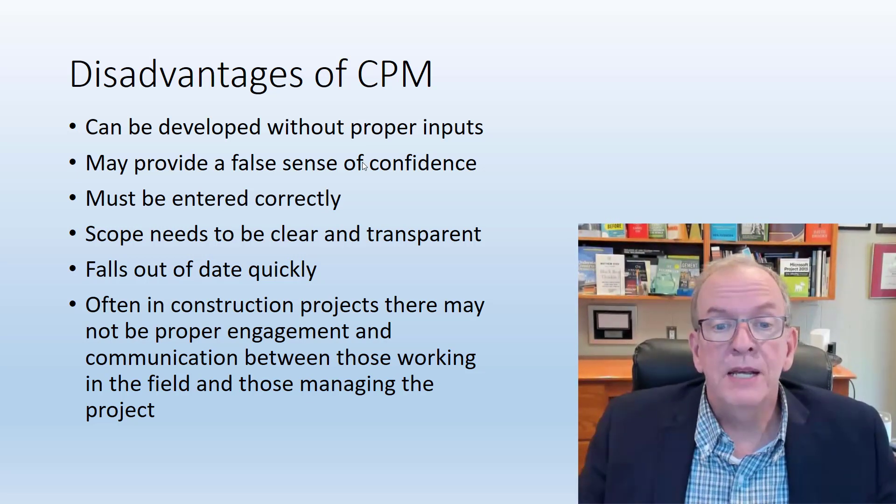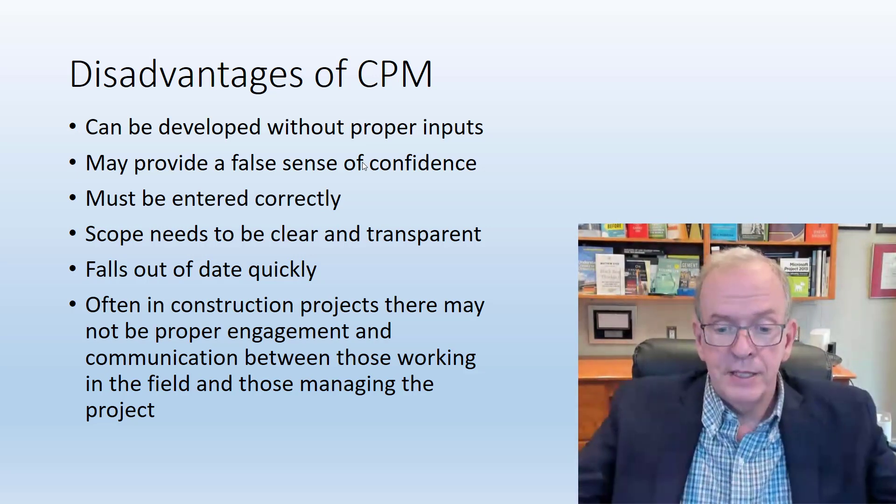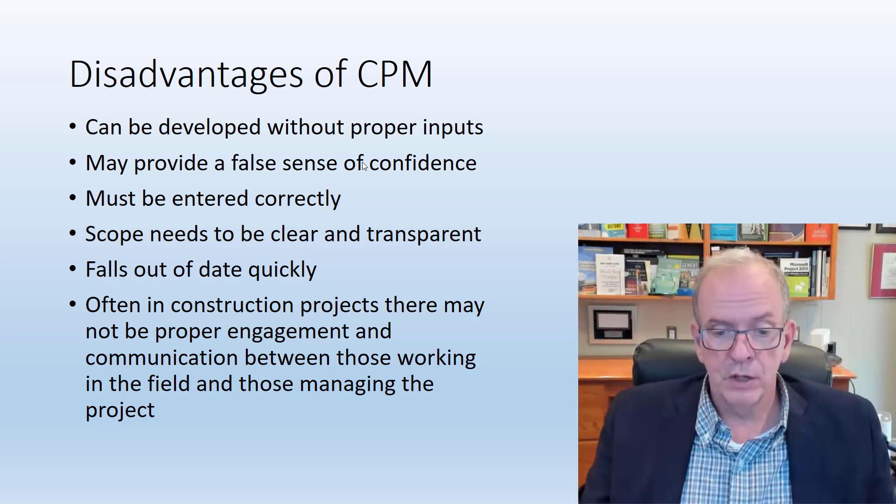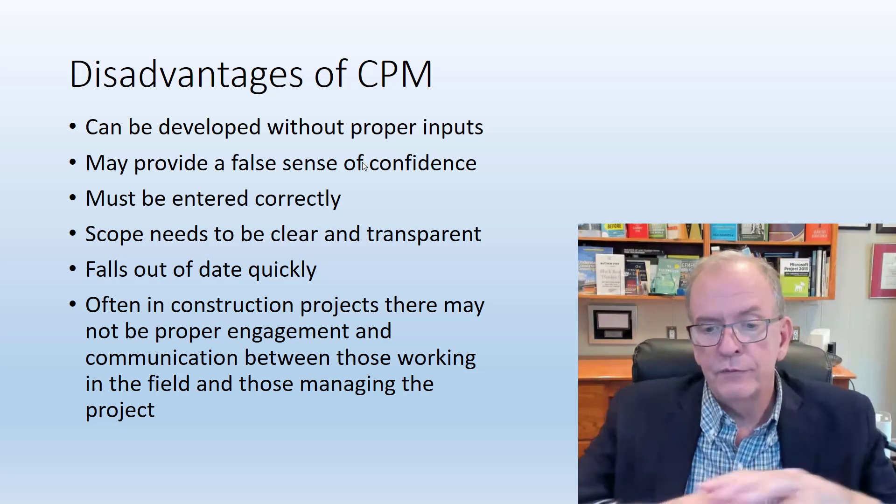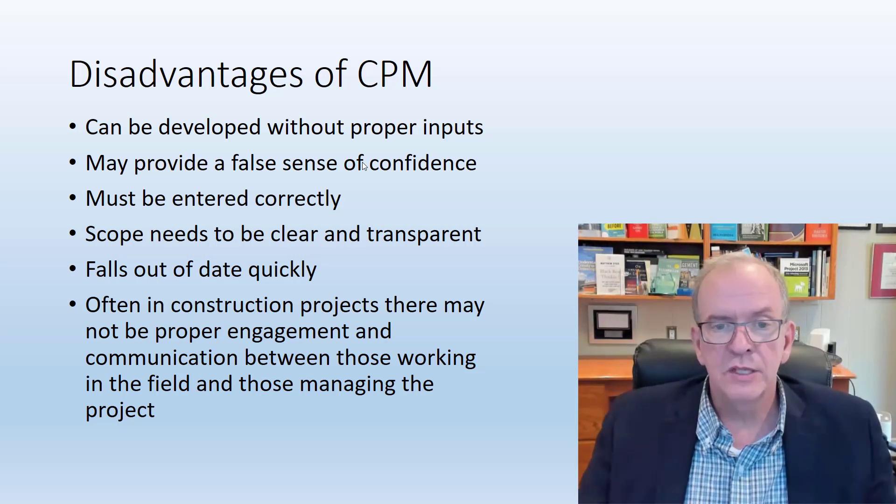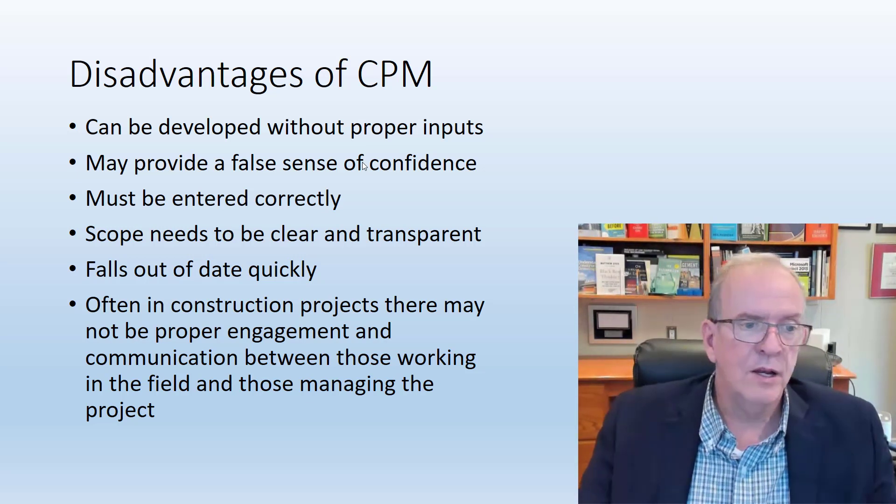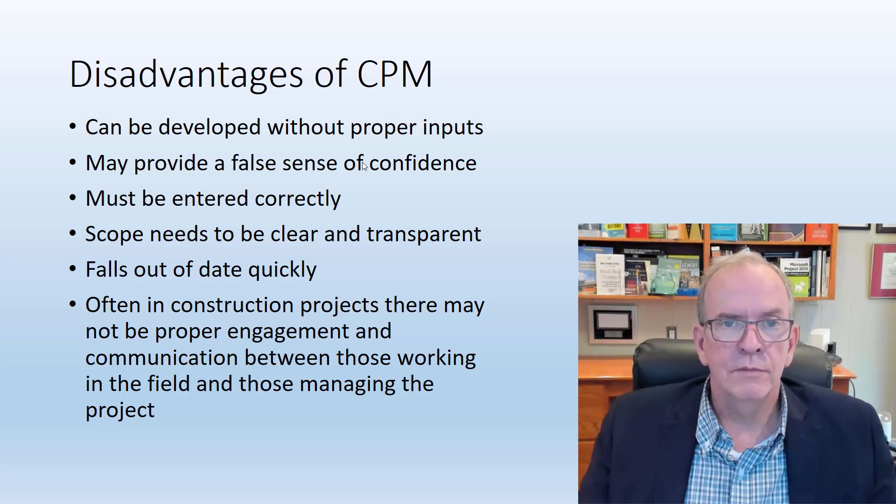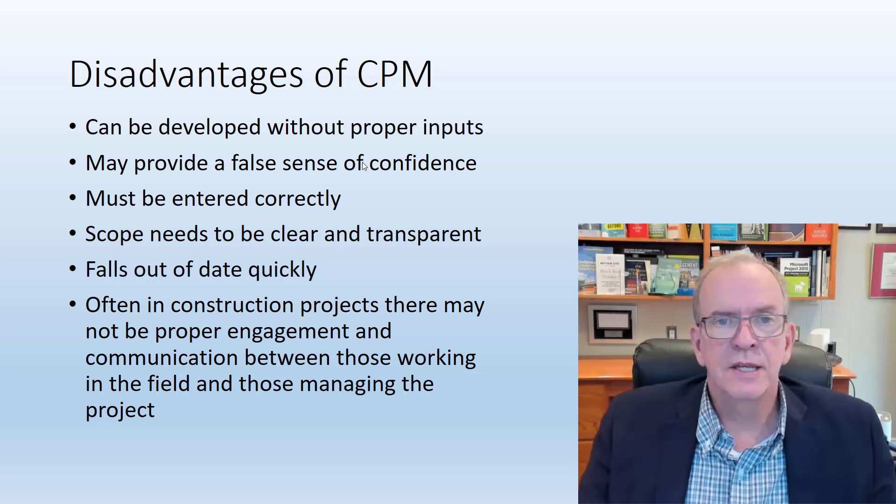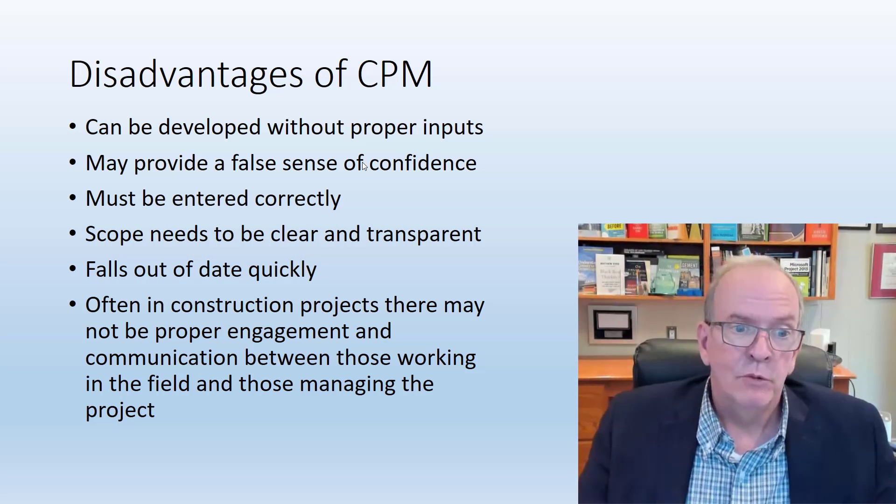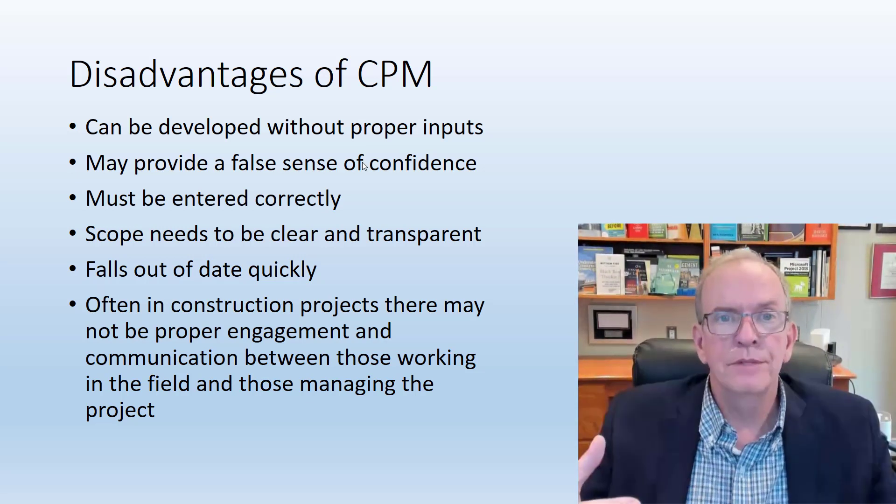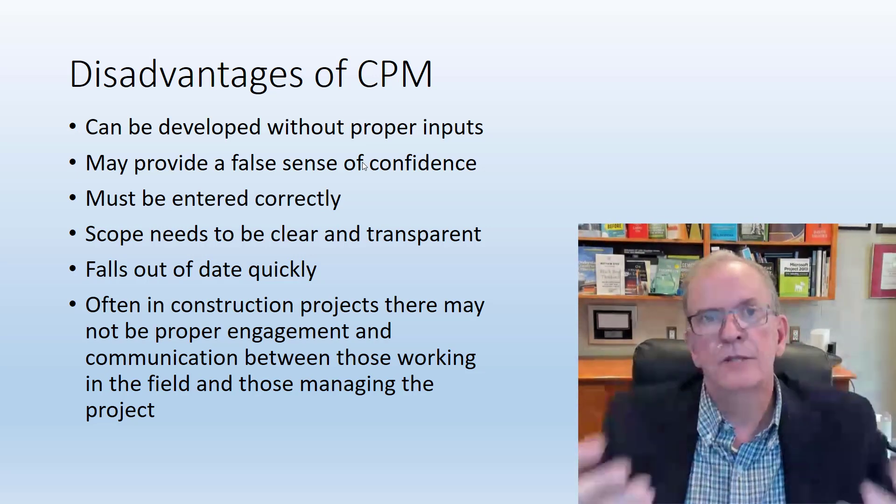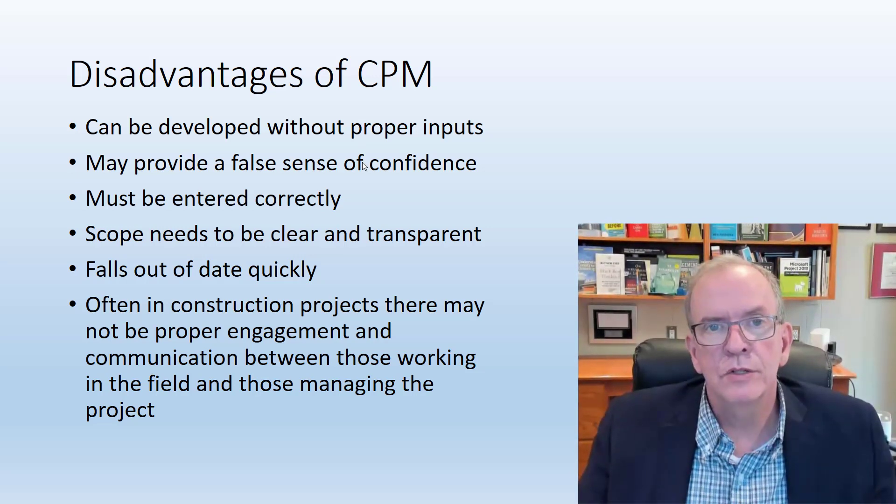Scope needs to be clear and transparent. If you're basing this schedule on a set of drawings and specifications that has a lot of issues and mistakes and errors and gaps, well, every time something comes up that's going to be impacting your schedule.